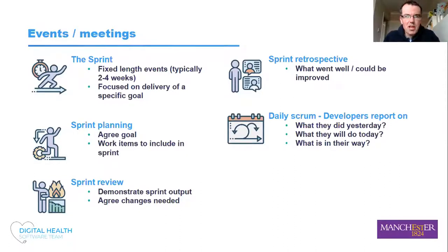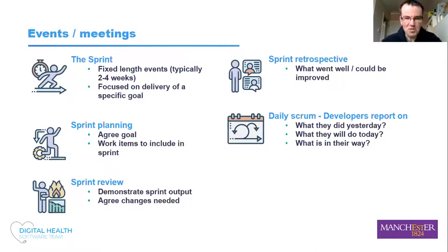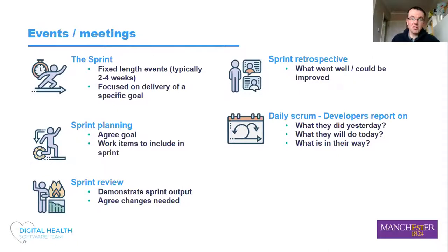The sprint is planned in a sprint planning meeting, where the goal or goals are agreed. Based on those goals and the prioritization of requirements by the product owner, work items are added into the sprint. At the end of the sprint, there are two meetings. One is the sprint review, where a demonstration of the sprint output is done — to share what was achieved, even if it wasn't what was originally planned — followed by discussion about what changes are needed to what has been delivered.